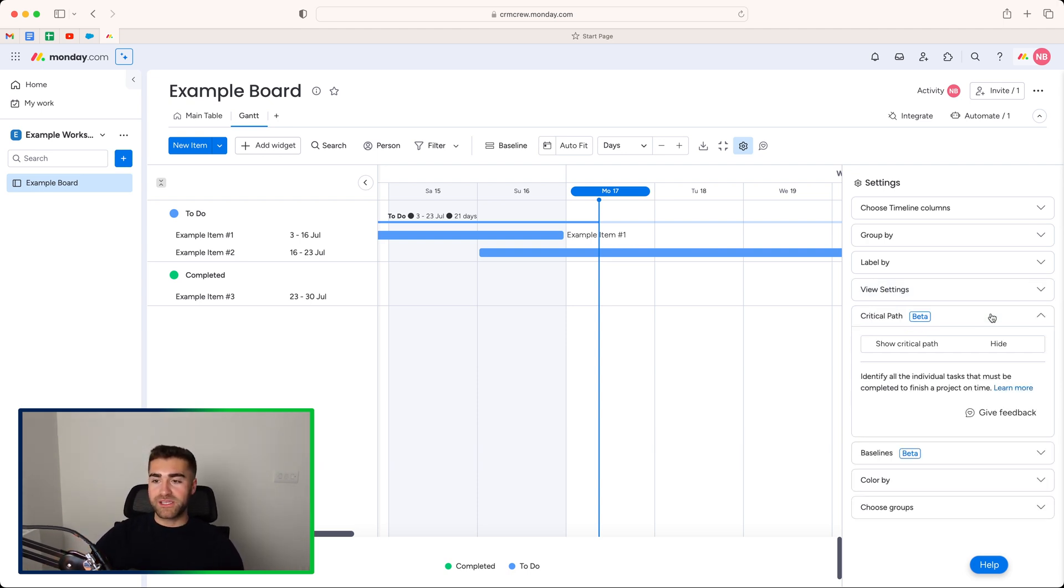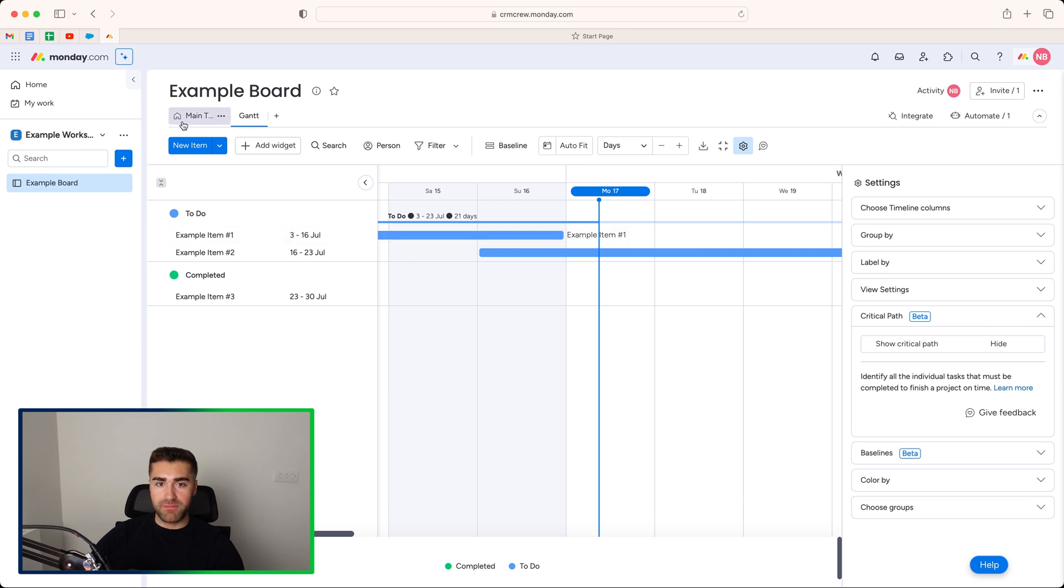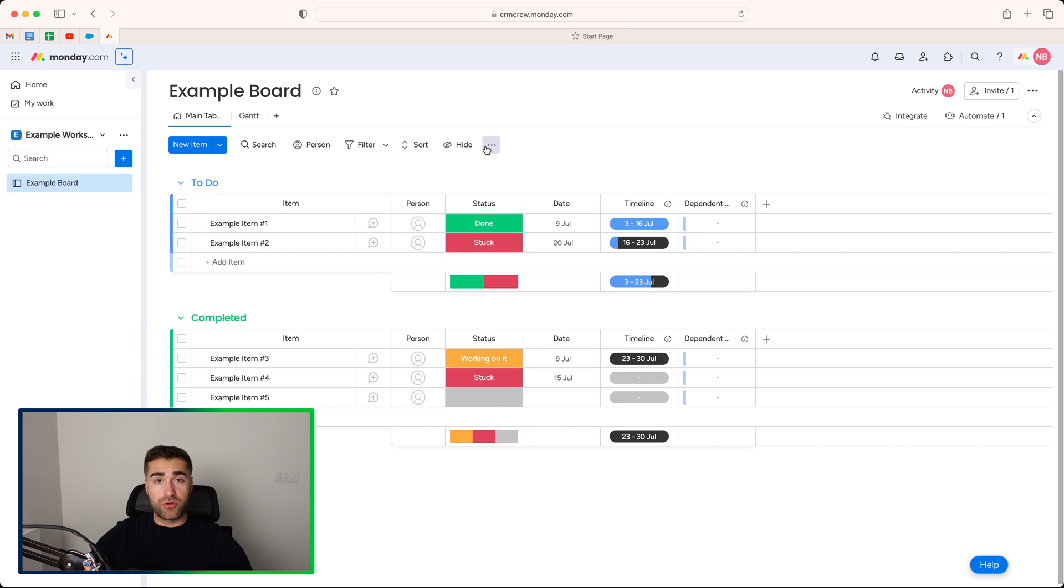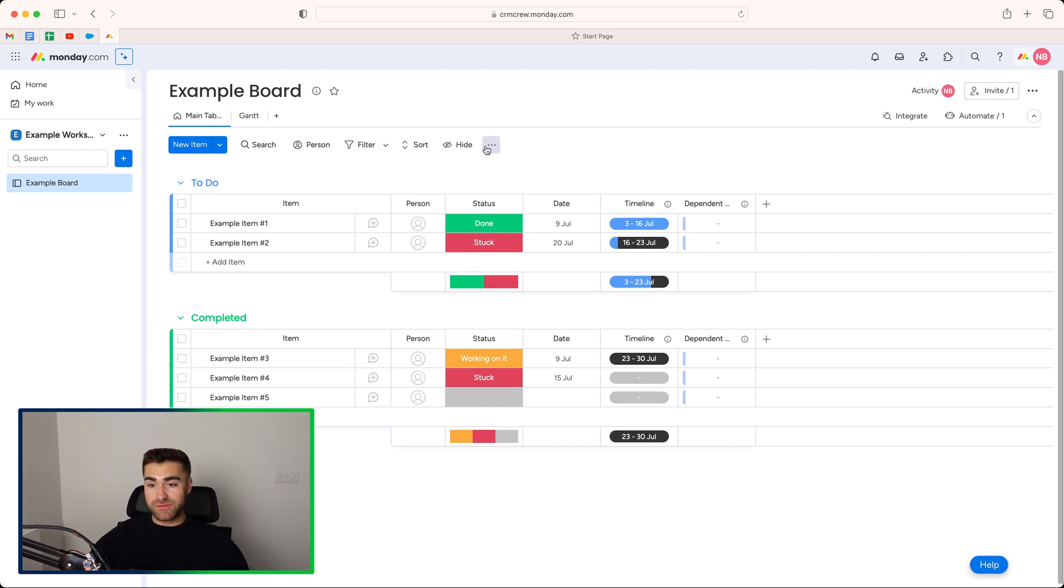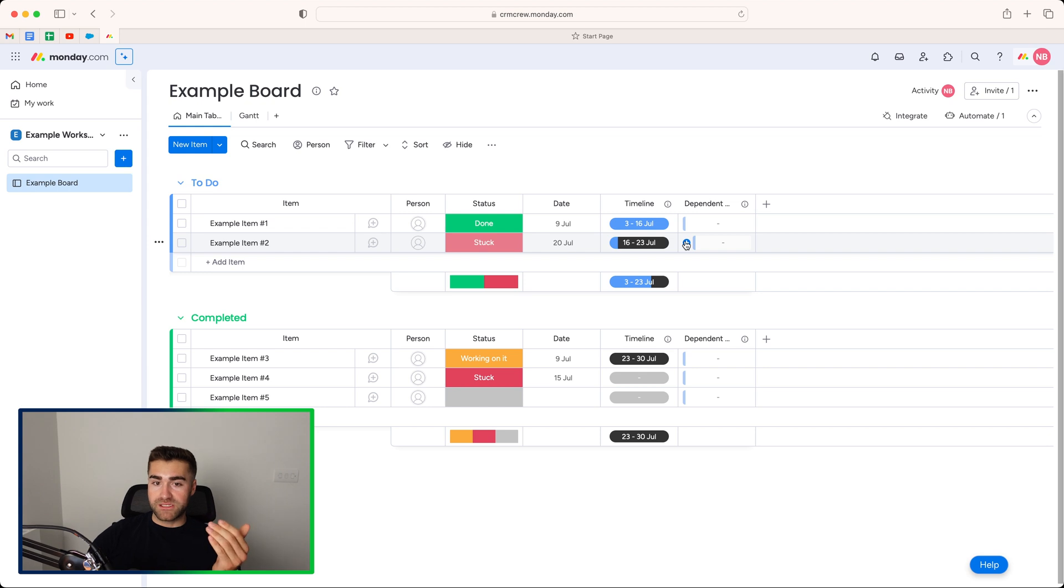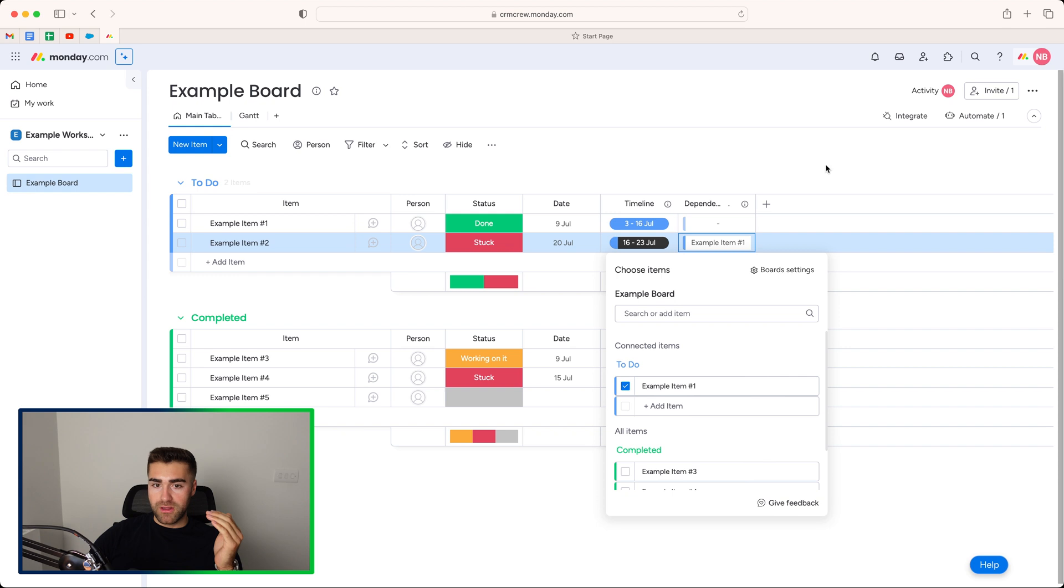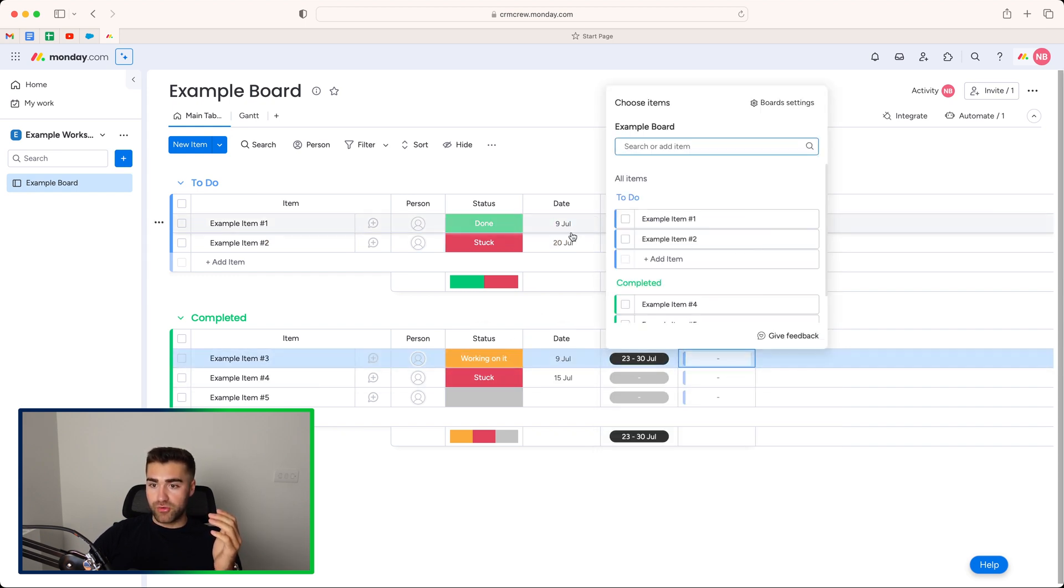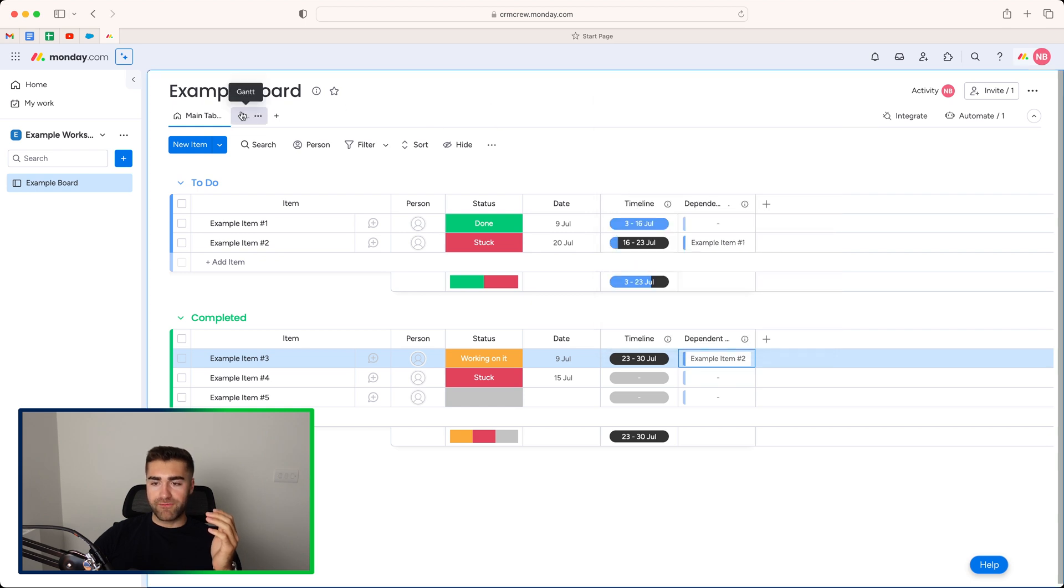And then we have the critical path. Now this doesn't require, but it's definitely complemented by the dependency column. So what I'm going to go ahead and do is just head back to my main table. Now, if you are unfamiliar with the dependency column and have no idea how to use it, check out this video links above that we have done that explains exactly how to use it. But what it essentially means is item two is dependent on the changes of item one, so on and so forth. So I'm going to make item two dependent on item one, and then I'm going to make item three dependent on item two.